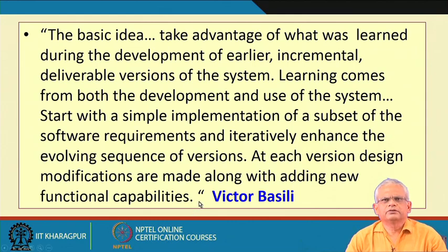At each version design, modifications are made along with adding new functional capabilities. Just to explain what Victor Basile has to say about an incremental model is that the software is developed in increments. In the first increment, some of the core functionalities are implemented, and then these are given to the customer who gives feedback, and this forms a learning from the use of the system.